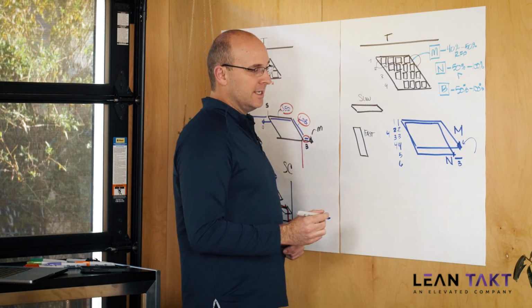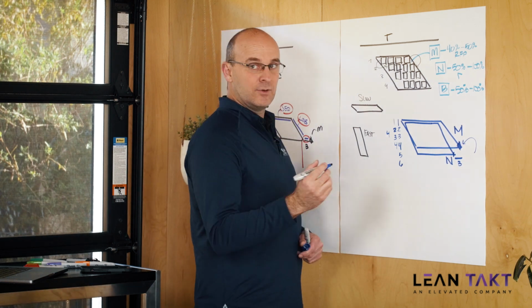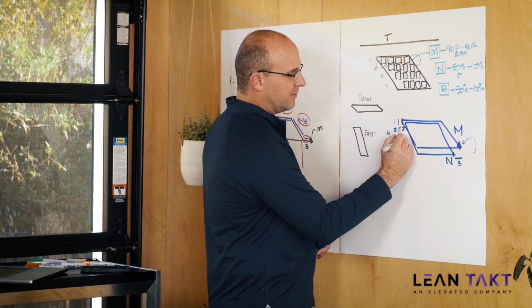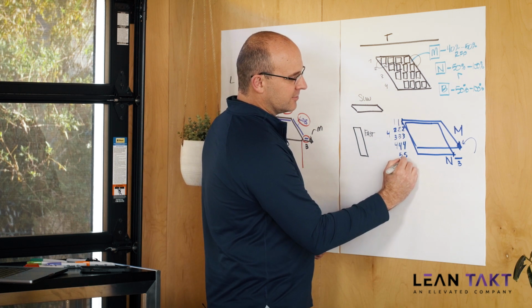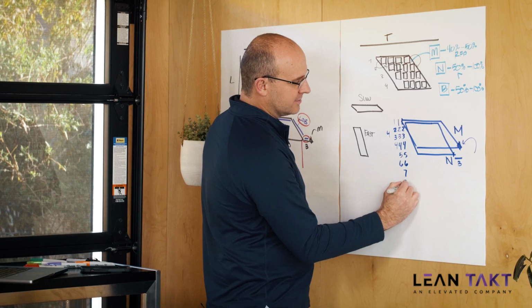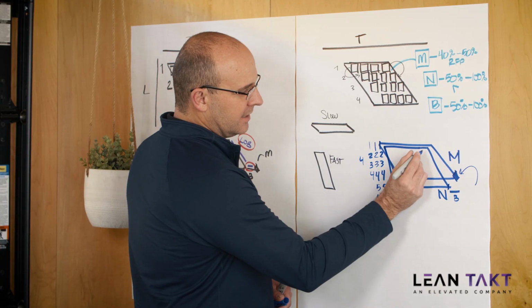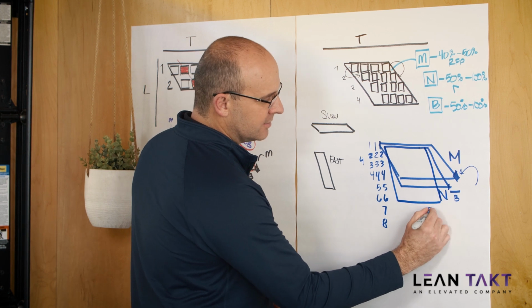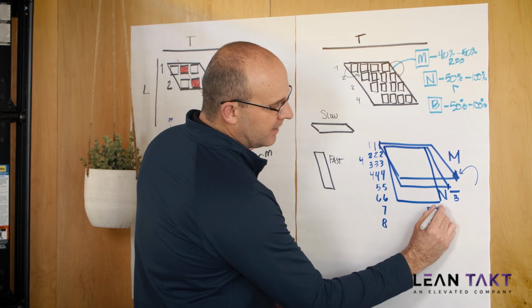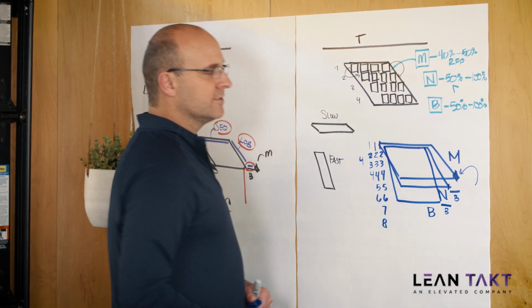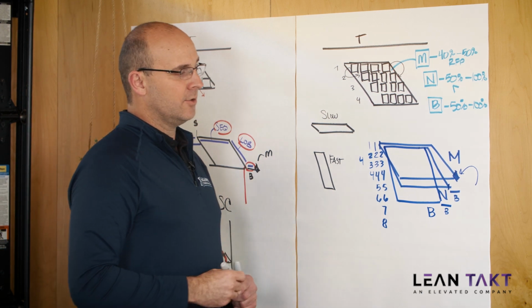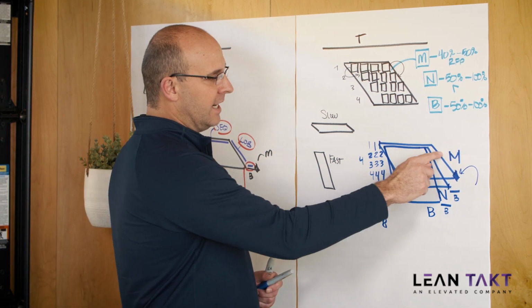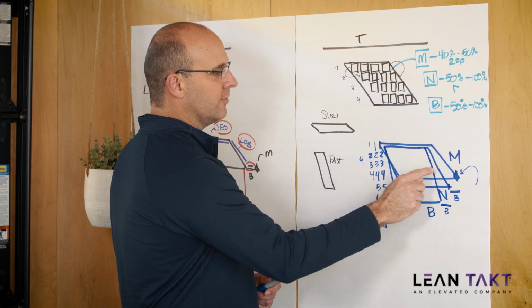Now, here's another key part. I always like to say, well, what is a backup? Maybe you and the trade partners say, well, if we ever get in trouble, we could go to 8 zones, and this is what it would look like, right? I'm just exaggerating this. So this is your backup. You would be able to gain even more buffers in that sequence. So your shapes will be different. So macro, norm, backup, macro, norm, backup.